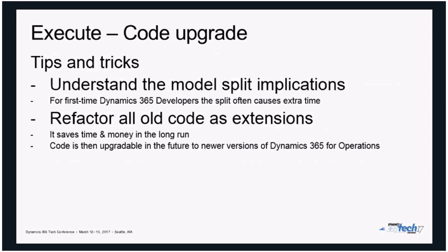You cannot reuse those objects right away from each of those packages. You have to remember which of the models, which of the packages depend on which, in order that you do not call them in the wrong sequence. So moving your existing code base across different packages and refactoring as extensions is going to really impact your end-to-end project timeline.